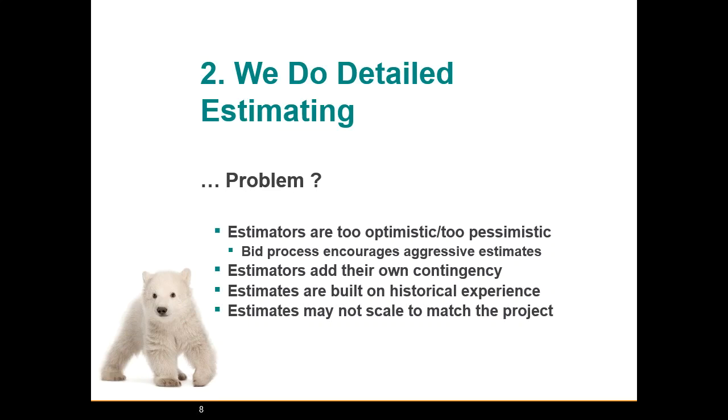And the other thing that happens is sometimes people know that a project won't go ahead if the estimate is above a certain amount. So they'll work the estimate down to make sure the project does go ahead. And in all of those cases, we end up with cost estimates which don't really reflect what's going to happen out in the field.